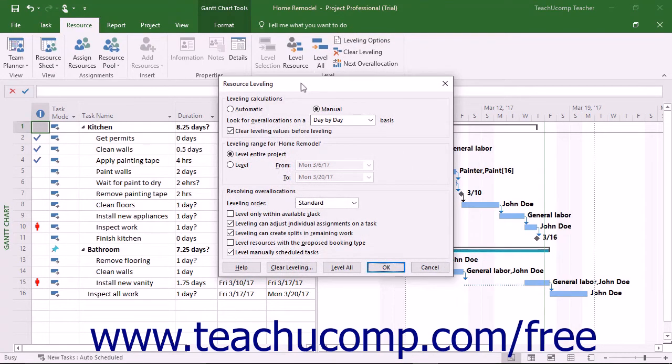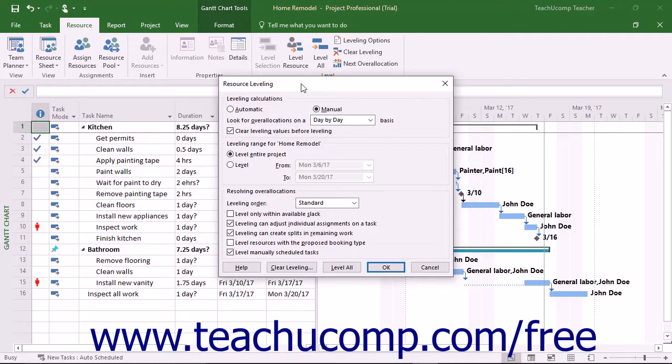This dialog box lets you control the processes and guidelines Microsoft Project uses when performing resource leveling. The settings you make here are applied to all project files, not just the currently selected project file.